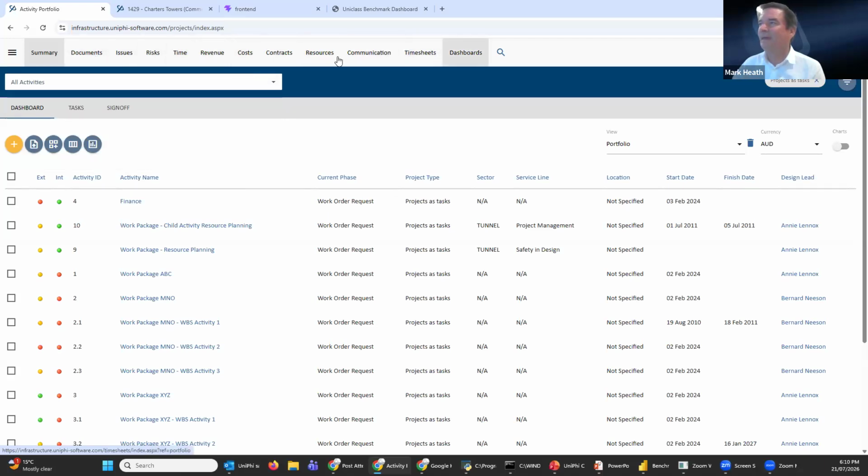So then when we look at the specifics of an engineering commission with commercials and project controls, the elements that we're trying to capture are people, their rates, and how that rate gets built up and changed over time, because these programs can go for a long period of time and rates will inflate. Their classification, what their role is on the job, and then from that, the time phasing of their effort. And so when are they going to be working on what package and for how long? That then gets baselined. So that gives us a baseline plan.